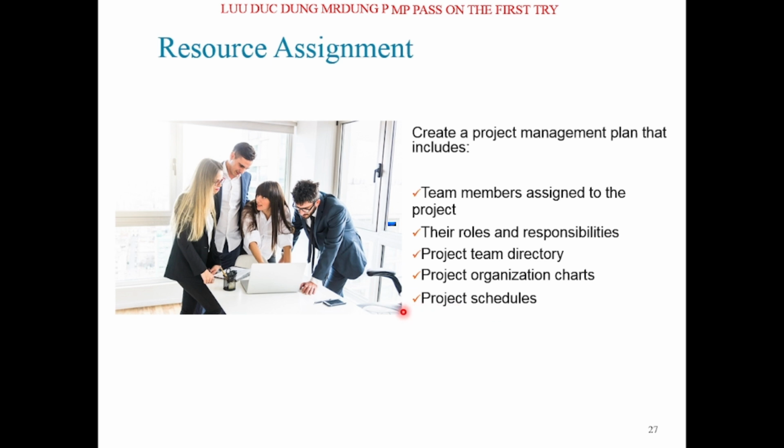Very important is the project schedule. The project schedule is very important in the project management plan: when the project starts, when the close phase, when the UAT, when the feedback, when the penetration test, when the go live, and dependencies should be laid down in the project schedule.